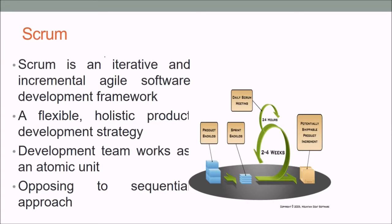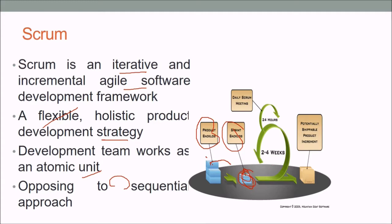Scrum is a type of agile — an iterative and incremental agile software development framework. It follows a flexible, holistic product development strategy where the team works as an atomic unit. It starts with a product backlog; the highest-priority backlog item is selected for a sprint. Within two to four weeks, the team delivers a potentially shippable product increment, with daily scrum meetings held every 24 hours.